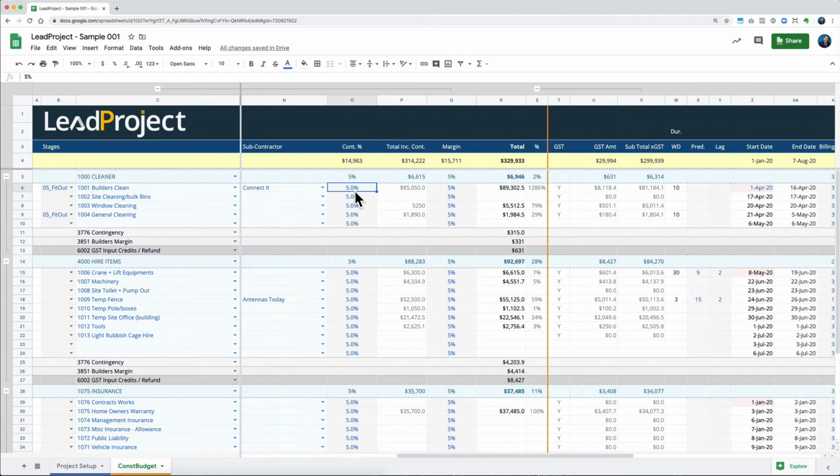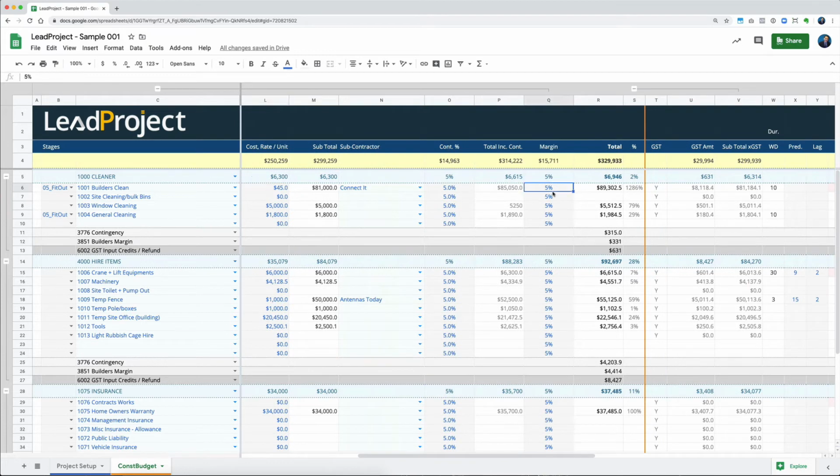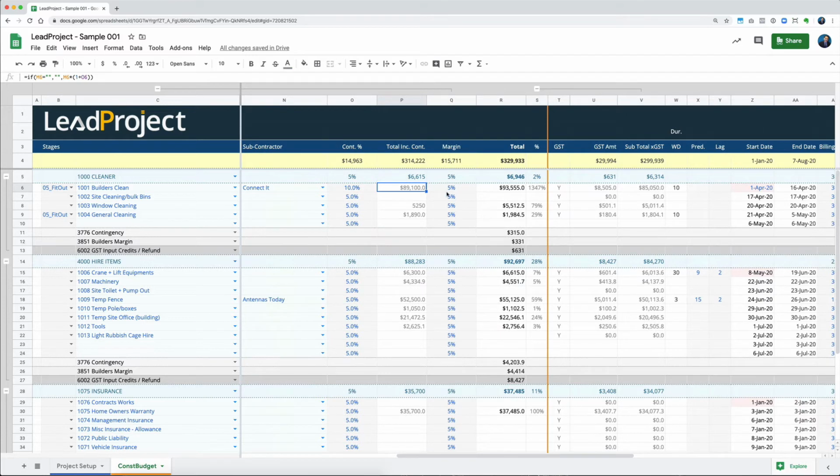So what's happening here is that it's giving you, okay, whatever that is, I'm not sure whether or not it'll be $45. It could be 50, could be $47, could be $43. And then based on whatever contingency that you want to allow on that line item, you can allow that right here. And then again, that total will increase by 10%, whatever you've done.